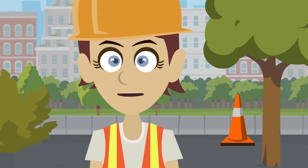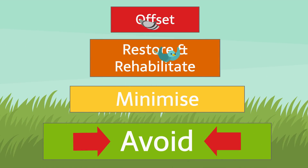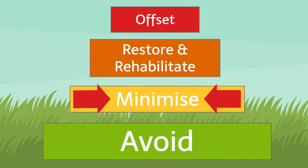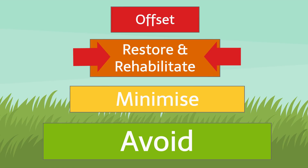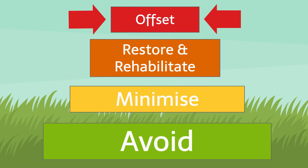The hierarchy prioritises how you might manage impacts to biodiversity in the following way: firstly, avoid any impacts in the first place; then minimise impacts to biodiversity as much as possible. If this is not possible, any damage to habitat should be restored or rehabilitated, and as a last resort, destroyed habitat should be offset through the creation of new habitat.